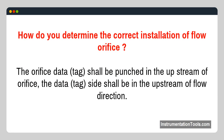How do you determine the correct installation of a flow orifice? The orifice data tag shall be punched on the upstream side of the orifice, and the data tag side shall be in the upstream direction of flow.